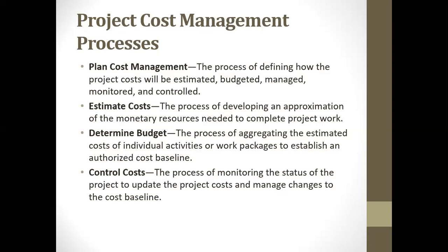So your 120 million is perhaps the planned baseline, the cost baseline. It is not the actual cost. So if that's 120 million, based on the influencing factors towards your project and the anticipated risks, you can give a magnitude of allowable estimate you want to give. So if your project is 120 million, you can go for plus 10% or plus 20% or plus 25% based on the identified risks and cost estimate.